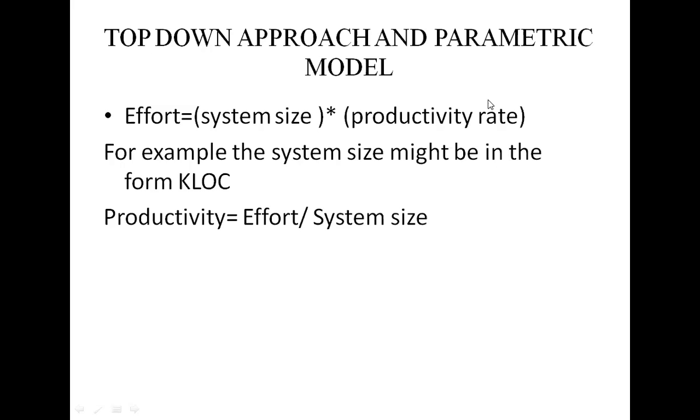That is the parametric model. For example, a house owner needs insurance coverage for his destroyed property. The insurance companies produce convenient tables to give the estimation of the house, considering parameters such as the floor space of the house and also the width and height of each room. All of these are estimated. So this is simply a parametric model.